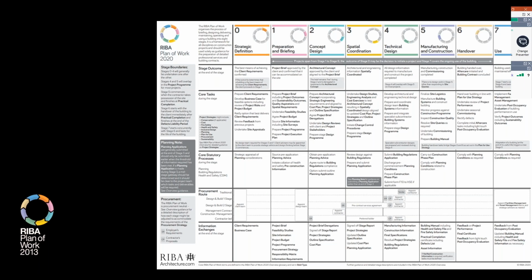So I guess the point I'm trying to make is the whole prescriptive descriptive notion needs to be examined outside of the procurement route, because it's not necessarily a procurement discussion. It's about who is best placed to produce the final design information for a specific aspect of the building. And that decision may be driven by design quality, it may be driven by cost, it may be driven by supply chain management. So there's a number of more complex issues that are influencing the whole value proposition around who is best placed to specify each one of the building systems prescriptively or descriptively.